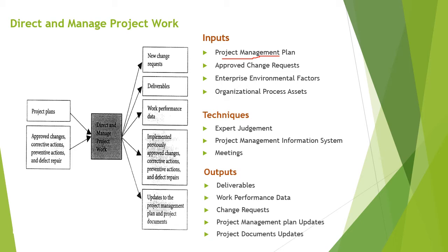The second input is approved change requests. Already we have discussed that those requests which have been reviewed and approved for implementation by the change control board will be input to direct and manage project work, for which the work will be executed, right? So these changes can either be a corrective action or a preventive action, or it can be defect repair, which we discussed a while ago, right?